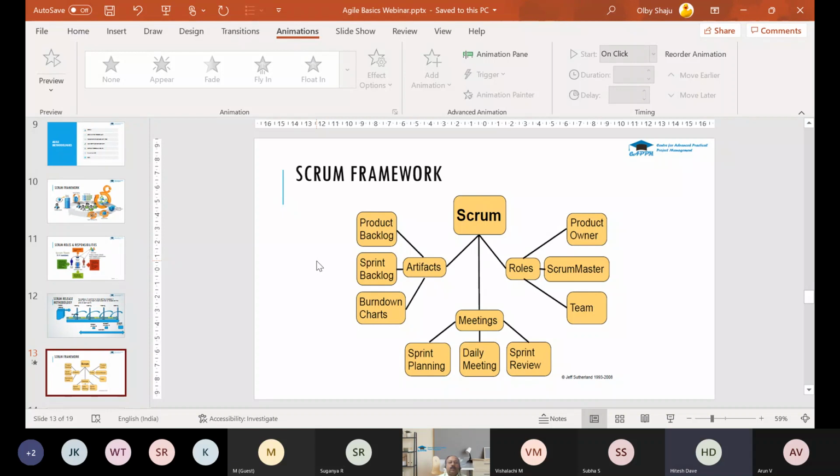Then will it not affect the planning for the next sprint? Yeah, it affects. At the start of each and every sprint, you're doing a sprint planning. There you will be deciding, since certain things could not be completed in the previous sprint. Why you could not complete them, you will learn in the sprint review and the sprint retrospective, and apply that in the next sprint. If in sprint one you accepted 20 story points and that was the main constraint, in the next sprint you will decide on 15 story points or something. Okay.